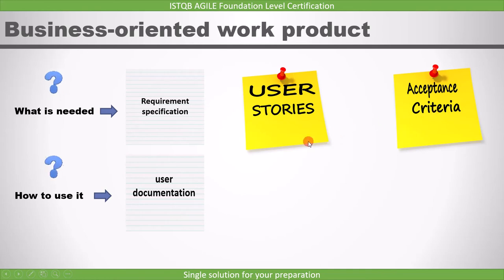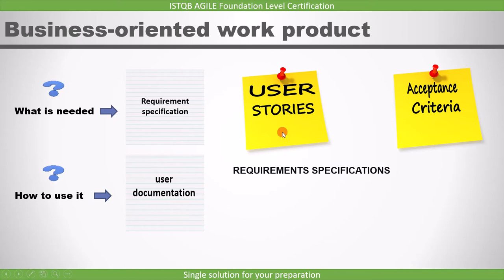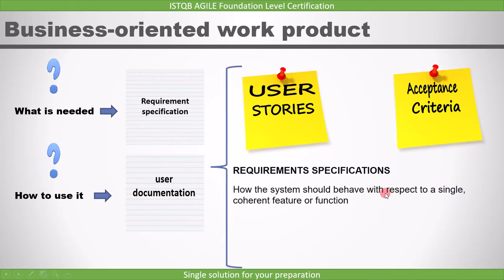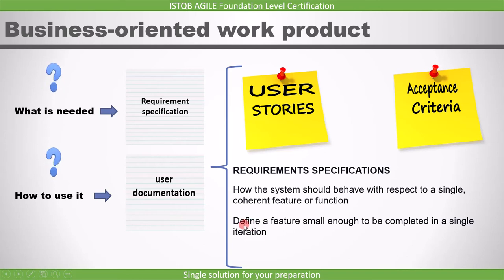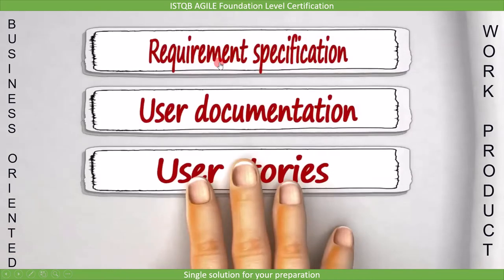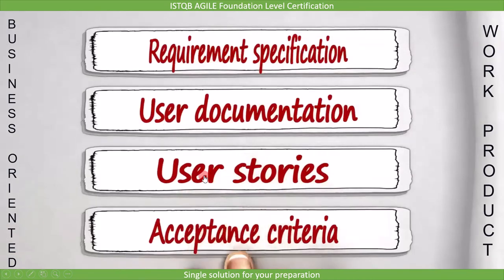In a traditional project, we use the term 'requirement,' and in agile, the requirement is referred to as a user story, provided by the business stakeholder. Therefore, user stories are a business-oriented work product. User stories are the agile form of requirement specifications and explain how the system should behave with respect to a single coherent feature or function. A user story should define a feature small enough to be completed in a single iteration. What you need to remember is: requirement specification, user documentation, user stories, and acceptance criteria are the work products of a business task.